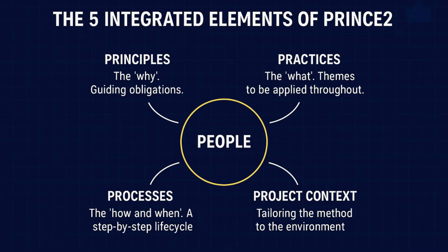If the principles are the must-dos, how does tailoring actually work? What levers can you pull? Tailoring is about adjusting the application of the method, guided by that seventh principle. It means consciously deciding how much PRINCE2 is appropriate for this specific project. You can adjust several things. Like the governance arrangements. For a simple project, maybe the executive also acts as the senior user. You combine roles. For a complex one, you might need multiple senior users representing different groups. Okay, roles can be adjusted.